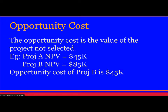Opportunity cost is the value of the project not selected. If Project A has NPV of $45,000 and Project B has NPV of $85,000, the opportunity cost of selecting Project B is $45,000 — the value we give up. The lower the opportunity cost, the better the project. Selecting Project A would mean giving up $85,000, which is not desirable, so we must consider opportunity cost before selecting a project.